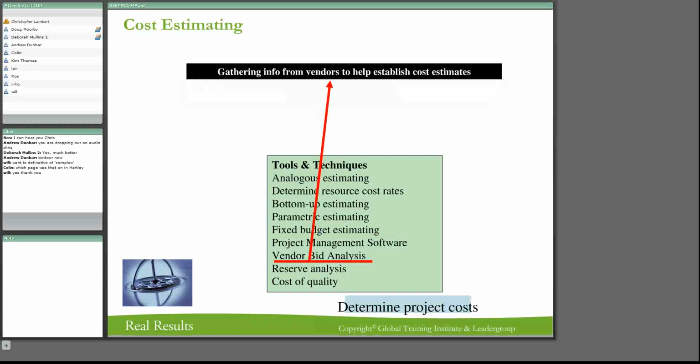The only problem is that you better have defined the details of your activities well, because if a contractor puts in a bid, he's going to slice his prices to the lowest so you can get the bid. But let me tell you something, if you choose a vendor and you haven't got all the activities in there, the subsequent change control on that is going to blow your project out very, very quickly, because the vendor is going to ask an arm and a leg to do extras on it.